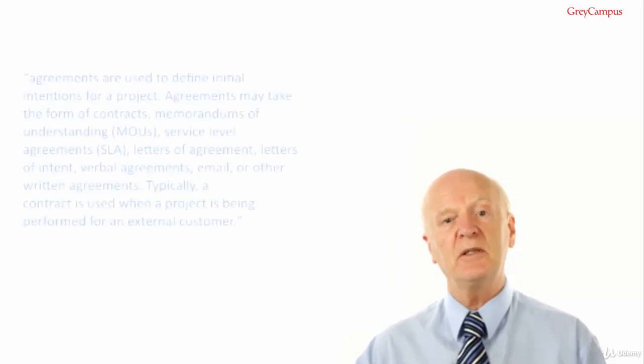Please note for the exam that the project manager uses the business documents but does not update them, because business documents are not project documents. The project manager can request that the business documents be modified, but the project manager is not authorized to make any changes. The next input to the develop project charter process is number 2, agreements.